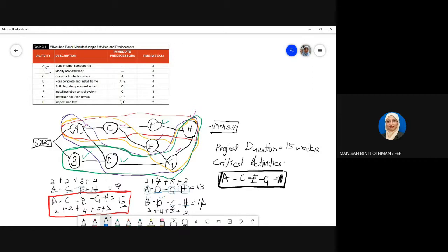let's say you want to construct a park, one recreation park. So you already plan what activities you need for this recreation park project, and one of the compulsory activities is that you have to build one extreme park in that recreation park, for example. However, in the middle of the project, your client says, okay, we don't want this extreme park. We want this area full of flowers, so that people come here to see the different flowers.